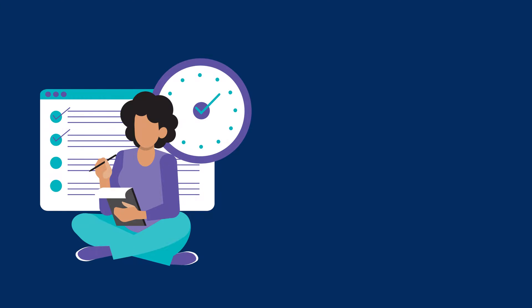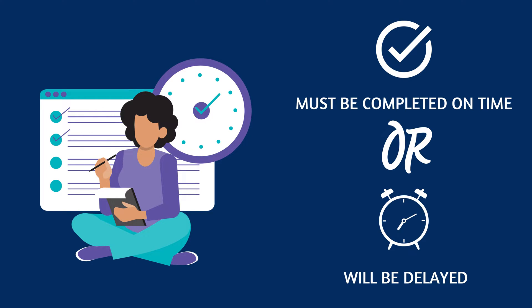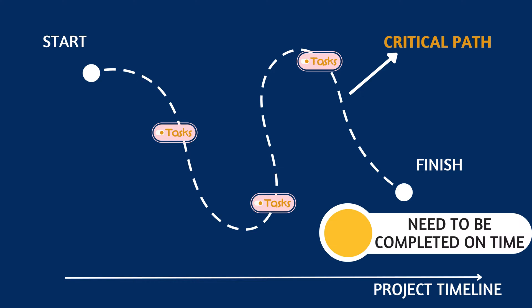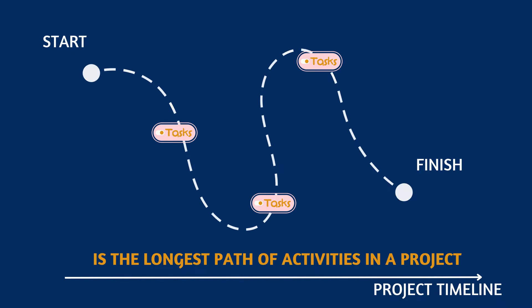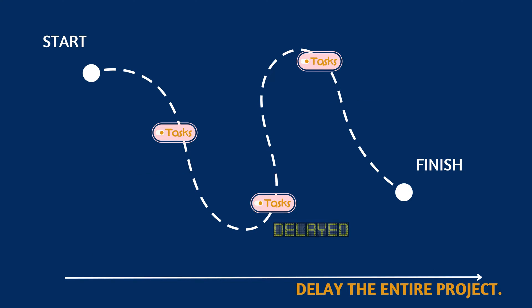In any project, there are tasks that must be completed on time, or the entire project will be delayed. A critical path is the sequence of activities in a project that need to be completed on time to ensure the project's completion date. It is the longest path of activities in a project, and any delay in these activities will delay the entire project.